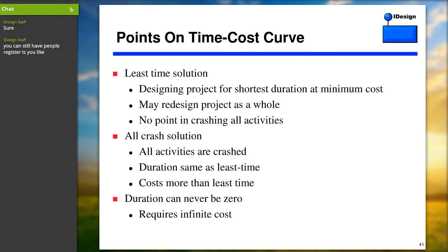Then there's another point that's called the all-crash solution. In the all-crash solution, you go in a brute force manner, you crash all activities in the project, regardless if they are on the critical path or not. You're not going to do it any faster than least time, but you are going to actually spend more.